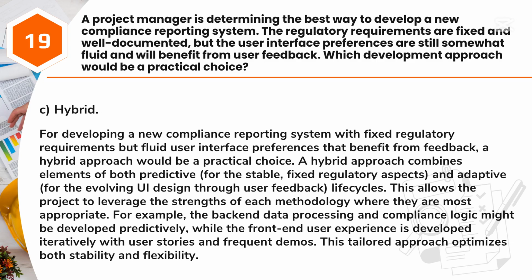Answer: C. Hybrid. For developing a new compliance reporting system with fixed regulatory requirements but fluid user interface preferences that benefit from feedback, a hybrid approach would be a practical choice. A hybrid approach combines elements of both predictive, for the stable, fixed regulatory aspects, and adaptive, for the evolving UI design through user feedback, life cycles. This allows the project to leverage the strengths of each methodology where they are most appropriate.